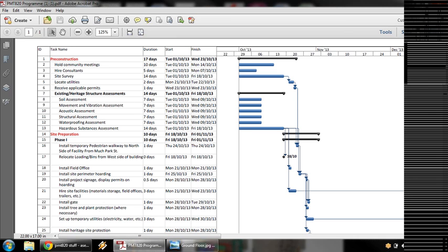Basically, the way we approached it was by using the English regulations for the project, which was the CDM 2007. It's quite a long document, and I read through it and selected the areas that were most relevant to our building, not necessarily all the things included in the document. Then I tried to tie them in and make them relevant to our design, and how we would implement them on our site.